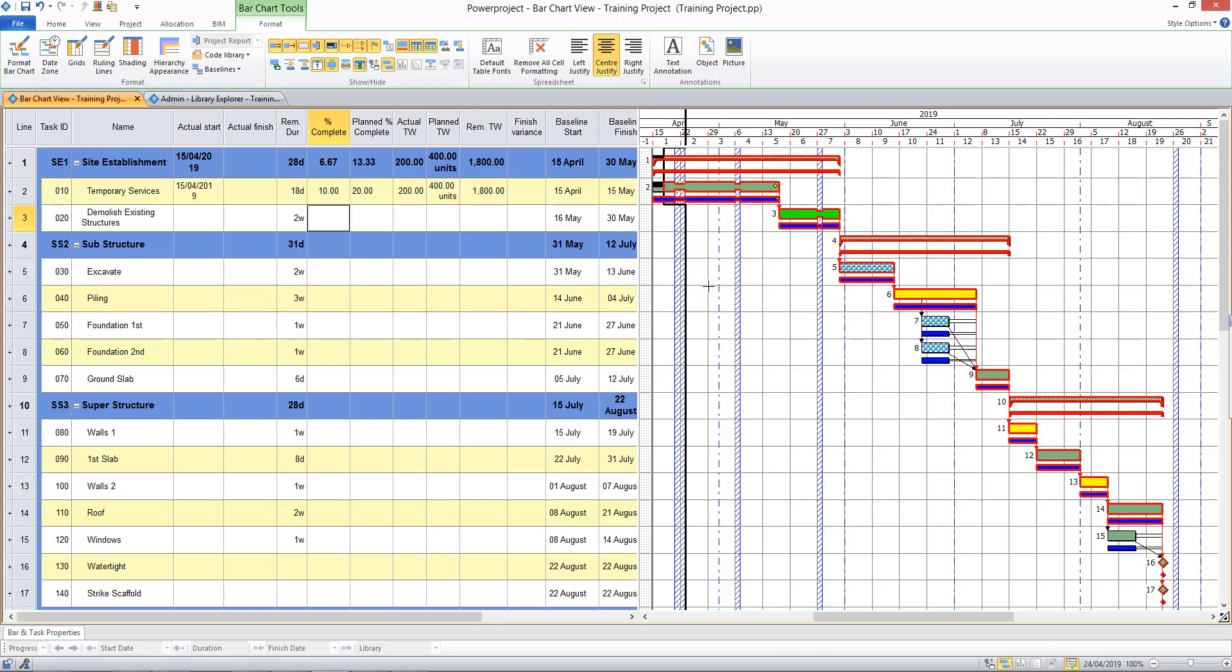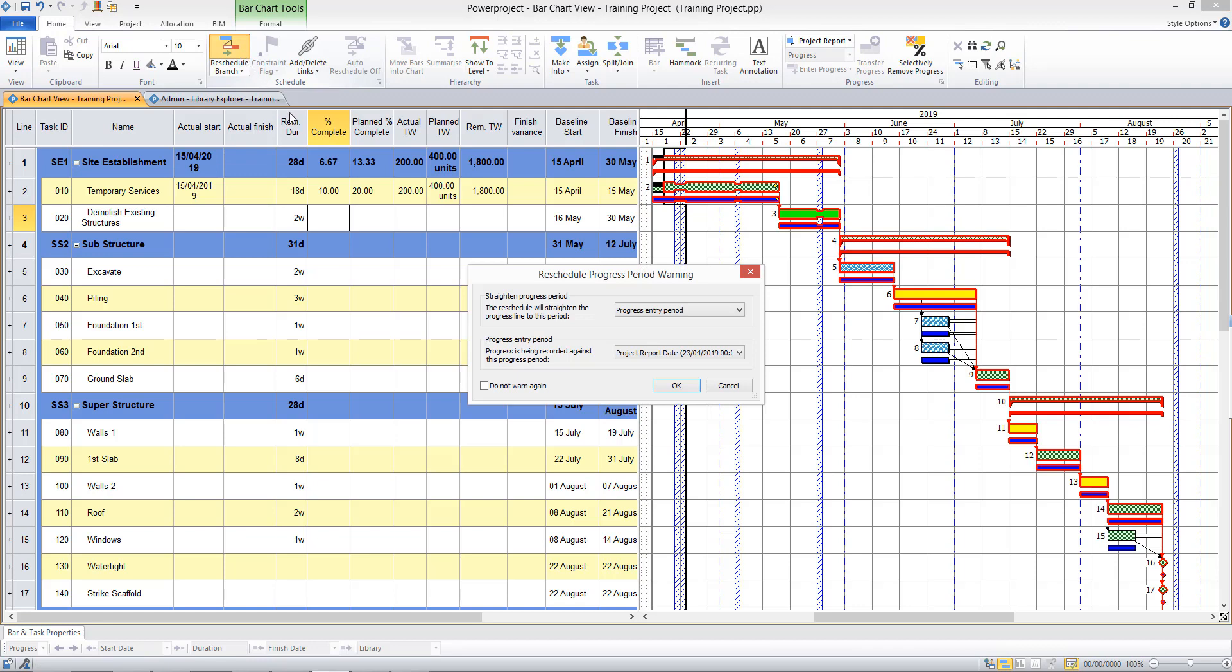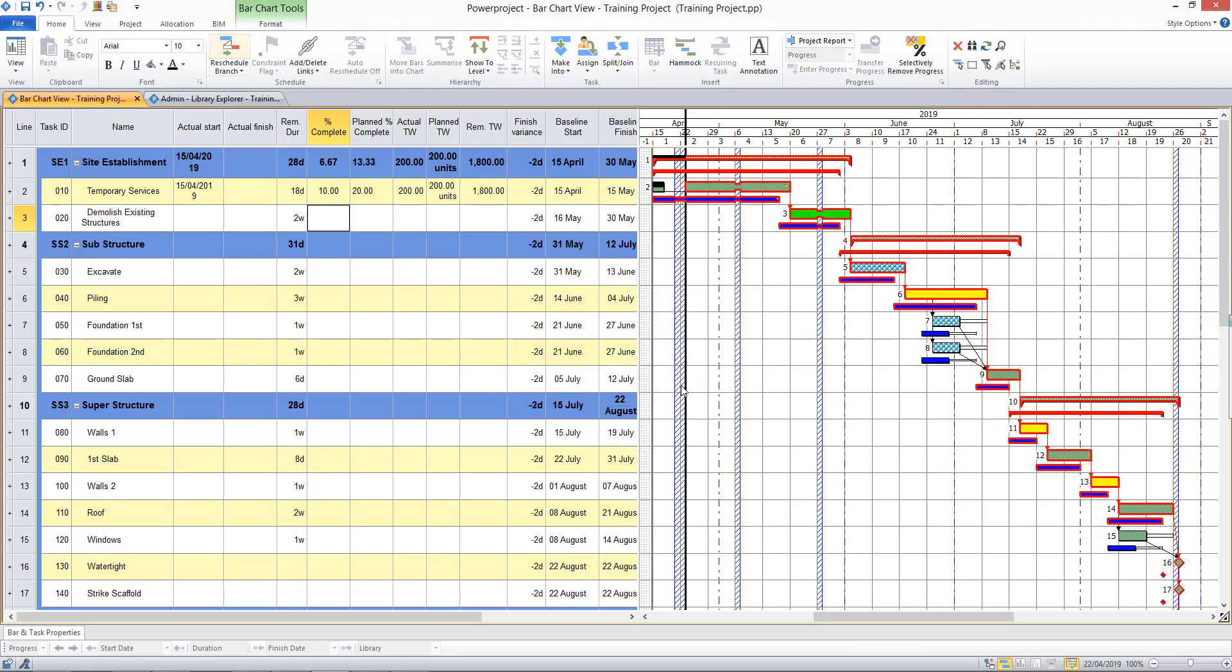And if I want to reschedule now to see the impact of that on the remaining work, I go to the Home tab, select the Reschedule button, and this time we're looking to straighten the progress period to the current report date, which is the 23rd of October. That pushes the remaining work to the right, and you can clearly see the variation against the baseline here as my end dates have moved forward in time.